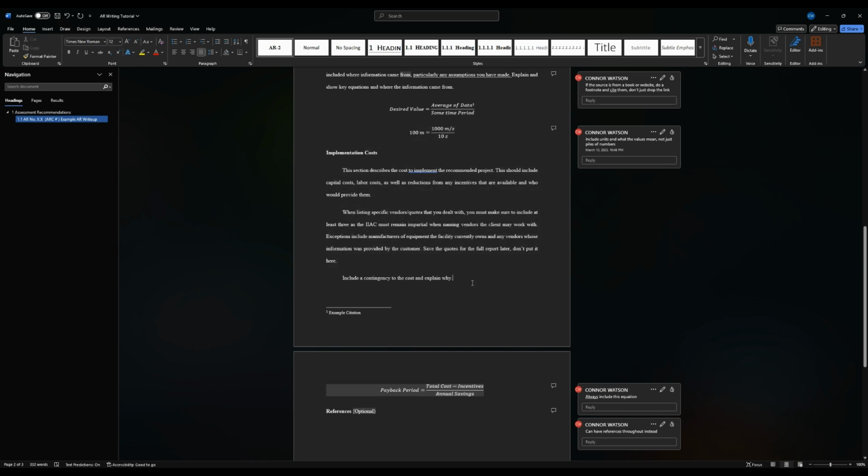One thing, this is relatively new, so it may not be in all of your other examples on Box, but we want to explain what the contingency is and why we chose the value for it. For example, in the solar panel idea, you might have a higher contingency than our typical 20%. Or if you have good quotes and good sources, you could potentially lower the contingency. We don't typically like to do that because that's just making it less secure for us, but you could.